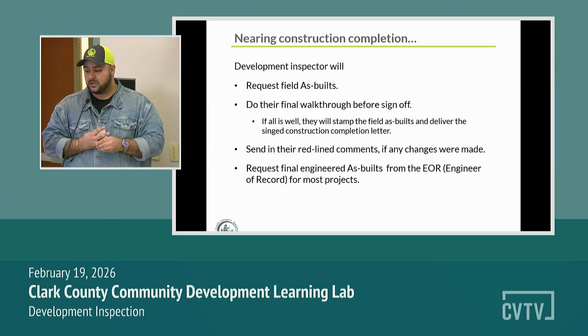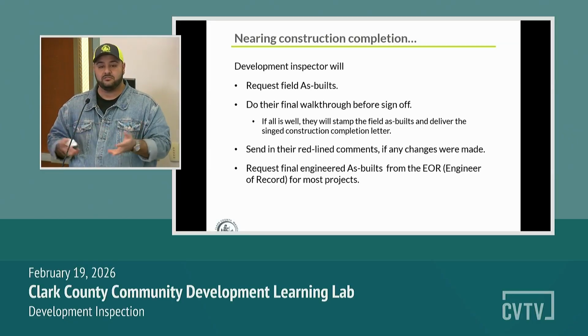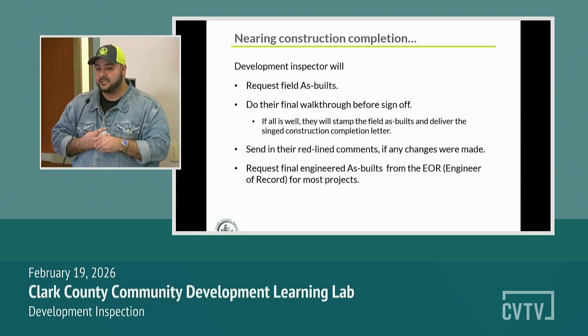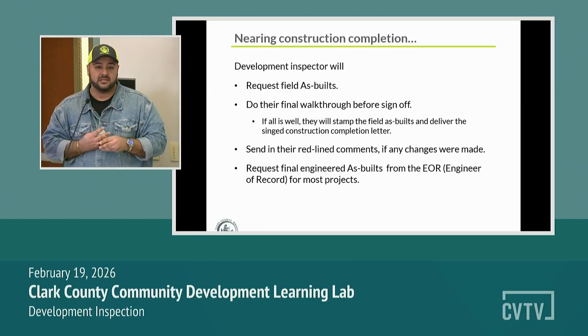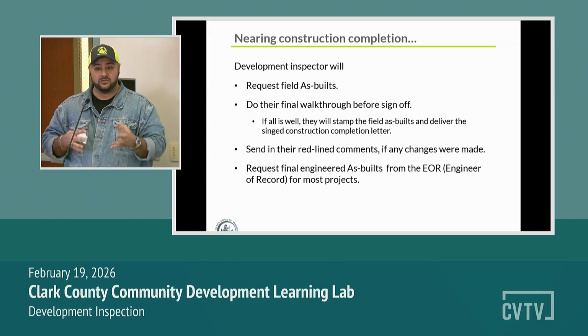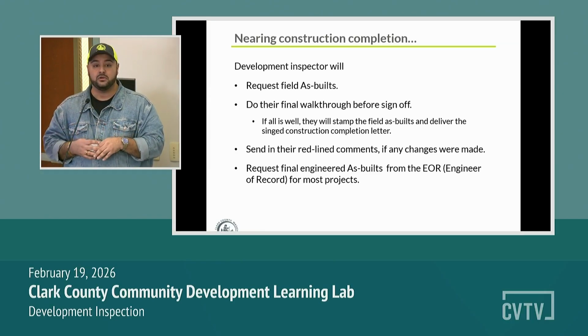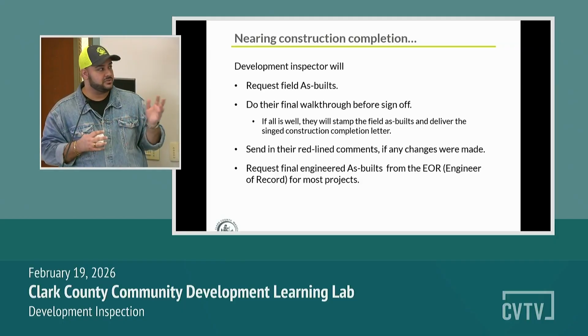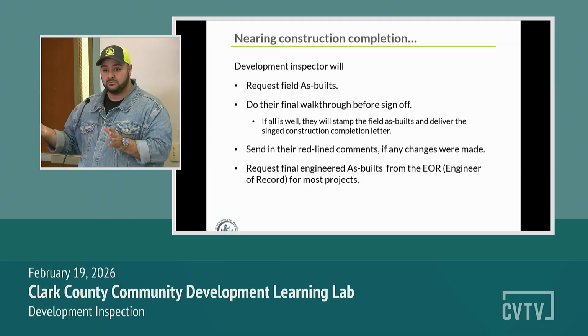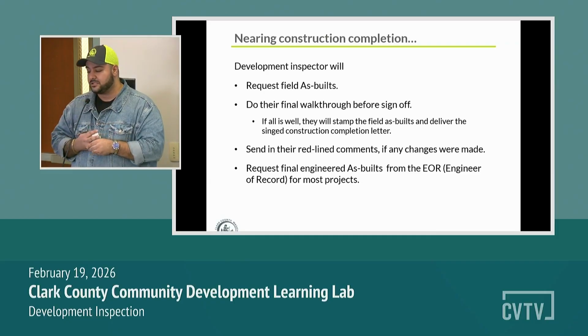The inspectors on the field as-builts, once they've done their final walkthrough, checked everything else, will have their red line comments. So this is why if you ever received an email from me kicking it back or saying we need those corrections, we really want to reserve that color just for our inspectors to make sure any corrections, any notes, anything that is on the plans is clearly notated and our engineer can actually review that clearly without any question.